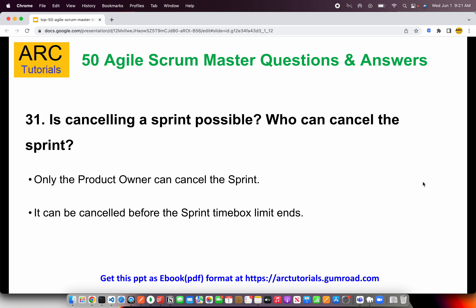The first question in Part 4 is: is cancelling a sprint possible, and who can cancel the sprint? This is mostly asked to Scrum Masters because they want to understand whether it is possible to cancel a sprint and who can cancel it — to understand the dynamics of how to handle a situation when a sprint needs to be canceled. The answer is: only the product owner can cancel the sprint.